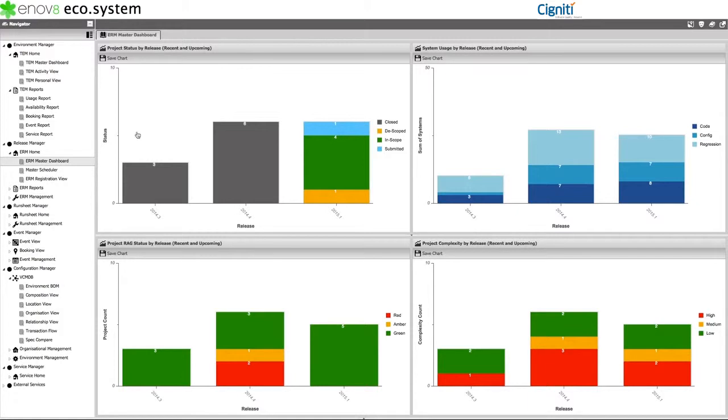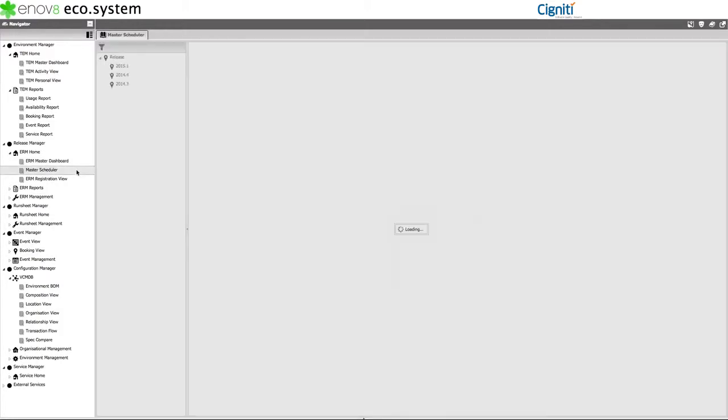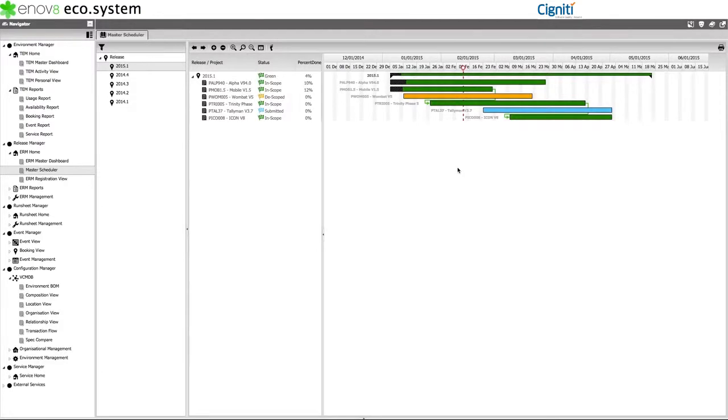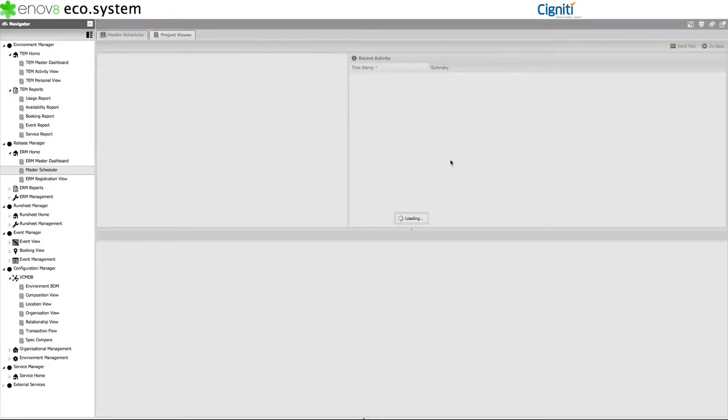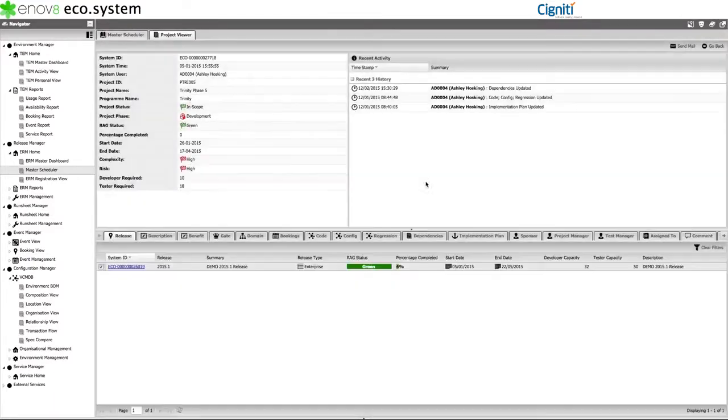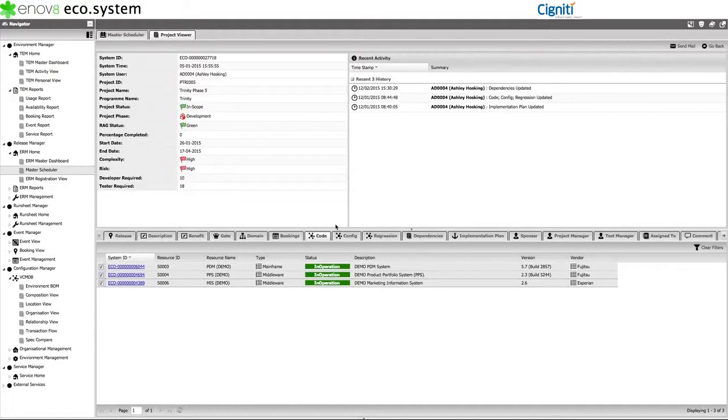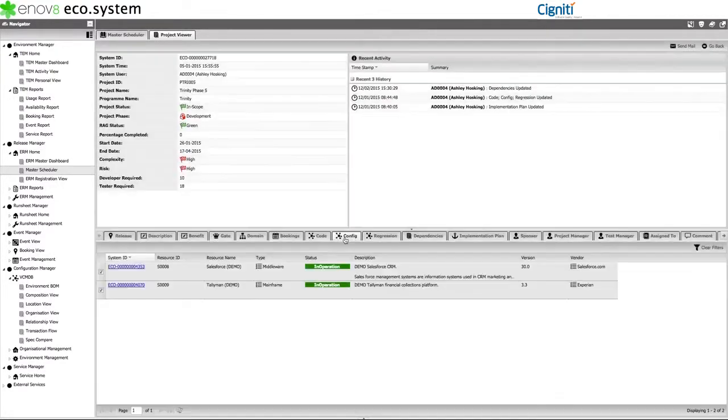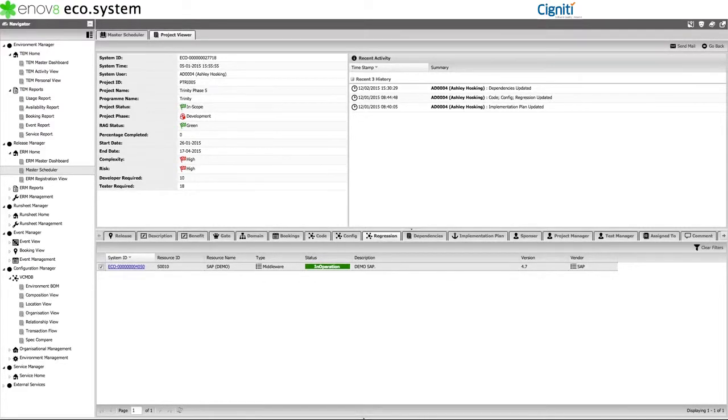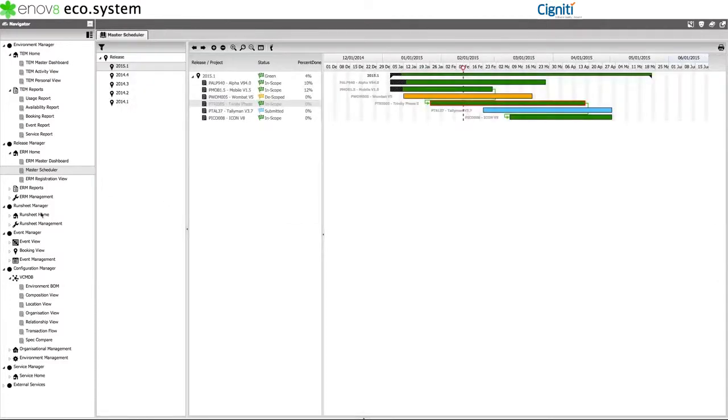One such mechanism that supports this is the Release Master Scheduler. The Master Scheduler basically provides a centralized view of constituent projects, dates, dependencies, and also offers deep-dive capabilities so you can review underlying project information and project system requirements. For example, what systems will project be code changing, configuration changing, or simply using for the purpose of regression testing. Information that will ultimately support proactive decision-making and timely environment operations.